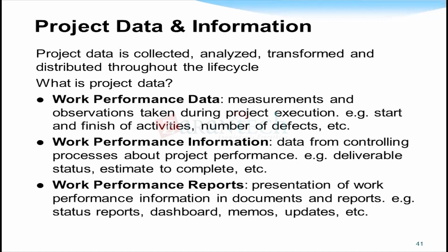How many resources in the project, how many hours they spent, all that you will be calculating. What is planned, what is actual. Like say you're planned for 1 month, each person working for 8 hours for 1 month, like 160 hours. This is a part of project charter?